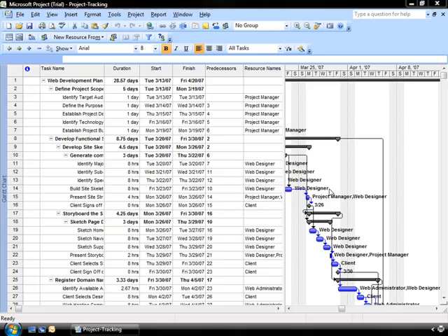You also have to make sure that you have a clear understanding of who's updating what information and when. So is there going to be one person in charge, other than yourself as the project manager, who's going to do the updating? And how often are you going to update the information? You don't want to track this in such a detailed fashion that you're spending more time gathering the tracking information than completing the project. So there's a good balance there. And I'm anticipating that if you are an experienced project manager, you've got some of these tools in place, and what Project 2007 is going to do is help consolidate them for you.